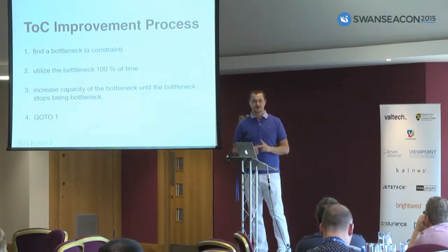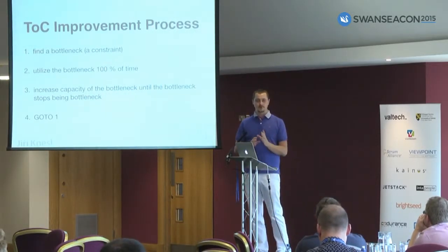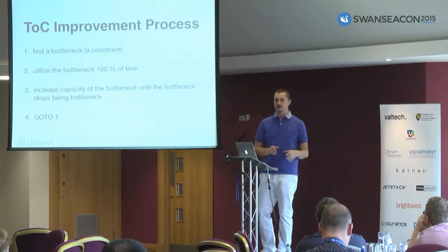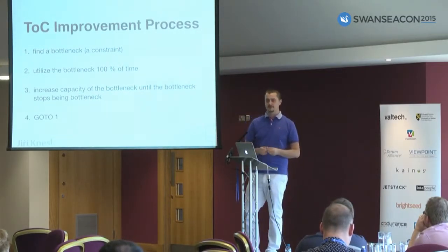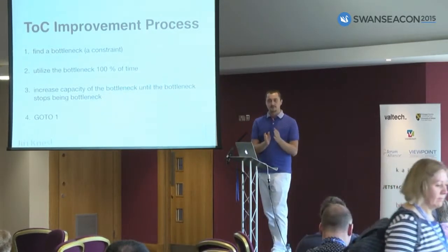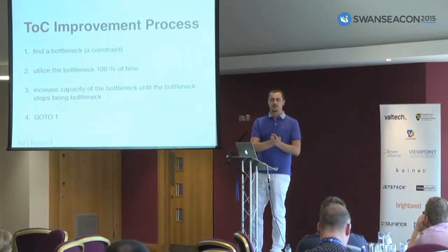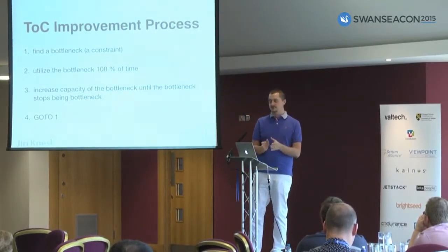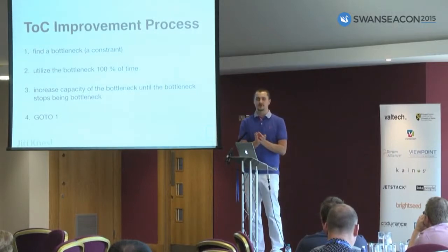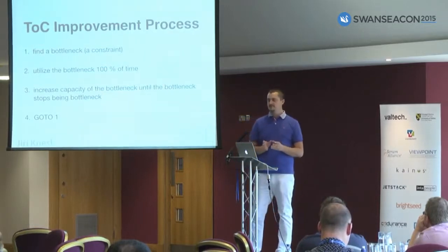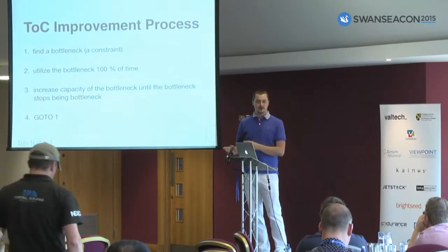I will use one more side note. I will use Scrum terminology today, but all those things I will speak about can be used in any methodology, and not only in software development. They are already used in manufacturing, in mining, and other fields of human endeavor. But when you have a bottleneck in software development, and the software developers do something different, when they are hired to develop software, and you force them to, for example, test software, the time which should be spent on development of software is lost, and is lost forever.